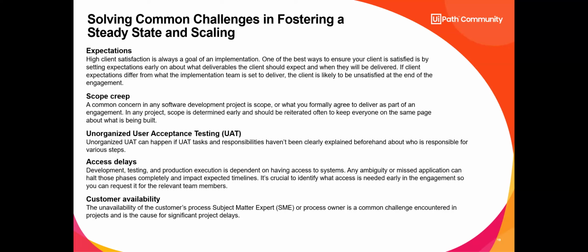Expectations. Most automation projects, and I talked about this when we talked about quality, are failing because there was not an agreement on expectations in the kickoff meeting. You didn't have a correct conceptualization of the client's expectations. The client changed their expectations or had a different idea of what the expectation was just by miscommunication.